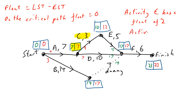Activity C actually has a float of two. The reason is that the float applies to the node, and we can see the difference of two in the back pass — that's the 9 and the 7, showing a gap. If you follow the book's advice blindly you wouldn't say that C has a float, but there have been past exam questions on this exact point where students make that mistake.